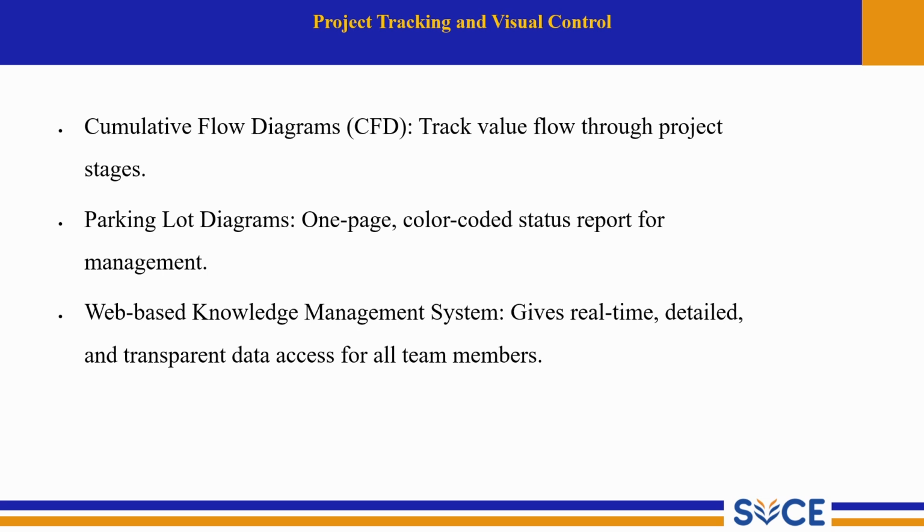Next one is parking lot diagrams, a one-page color-coded status report for management. In other words, these simple charts give executives a quick view of which areas are complete, in progress or delayed.